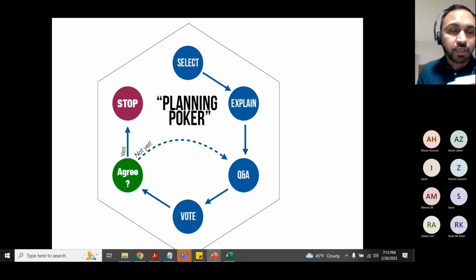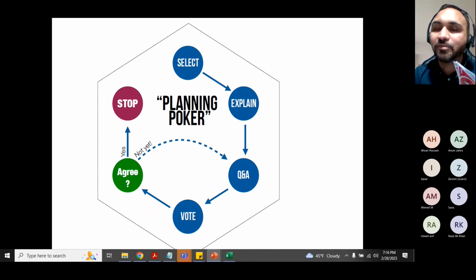Or if they are co-located and your agile coach is emphasizing using only planning poker, go for it. That's how the technique works. You need multiple decks of cards, one for each team member. You distribute them and then ask, are we ready to size this story? Okay, then show me your cards, and then start. And then you have to manually calculate. Okay, Ms. Shahed came up with three, and so on. You have to write it down on the board or something. So it's a little bit manual and tedious, using planning poker.